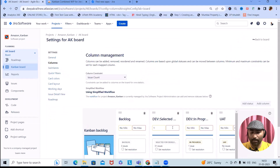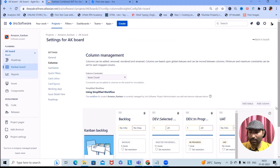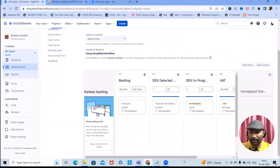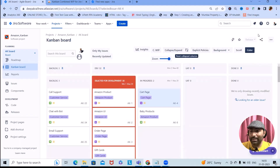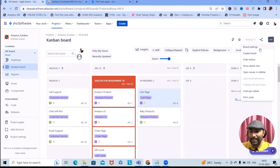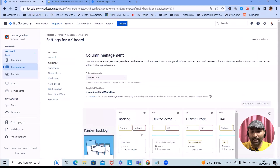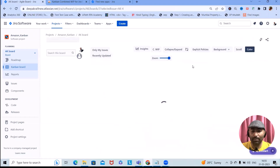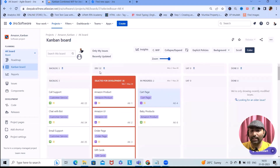We can set the minimum number to 1 and the maximum to 20 for each column. Once the configuration is done and the board settings look fine, navigate back to the board. From the board view, you can see the Dev section is now combined — 'Selected for Development' and 'In Progress' are both showing in one board.